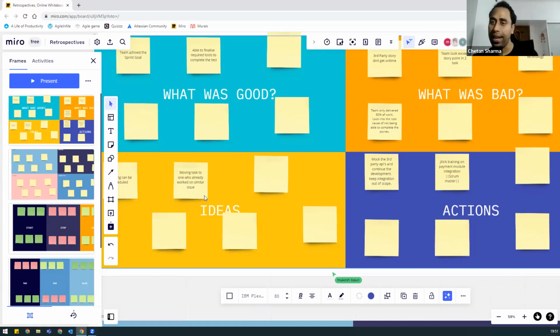Okay, this is a particular area where most of our team members are not aware. Only one team member worked on these kinds of things, and we know we have to work on this particular technology next sprint. During the refinement meeting, because we discuss the story, we identify what we need, what we have to develop, what we have to implement. Can we take one action item? Can we arrange one session by the guy who already worked in the past? Can he or she give a session on how the rest of the team members can do that?